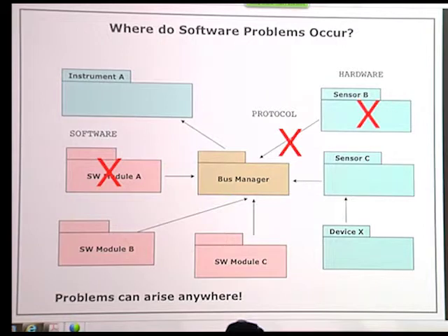So it's important to identify where the problem is occurring and what organization is really responsible for trying to resolve the issue. If it's a hardware issue, it might be pushed to the hardware groups, and they might handle the PFR in their domain, and the flight software folks might have no responsibility over it. But we will still be seeing the effect of the fault in the hardware.